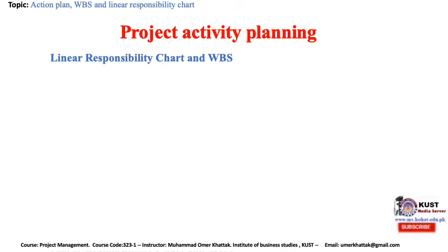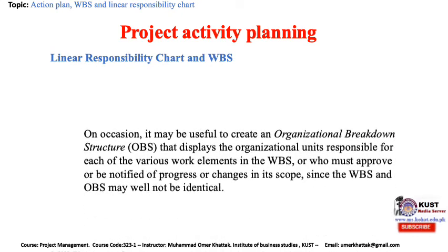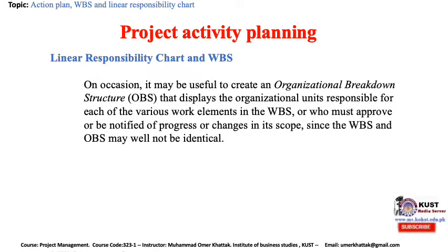Linear responsibility chart and WBS. On occasion, it may be useful to create an organizational breakdown structure (OBS) that displays the organizational units responsible for each of the various task elements in the work breakdown structure, or that must approve or be notified of progress or changes in its scope, since the WBS and OBS may well not be identical.